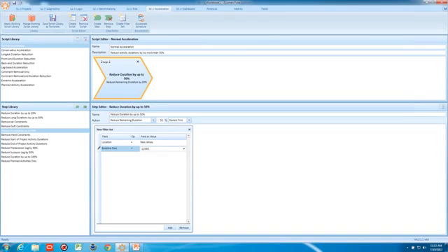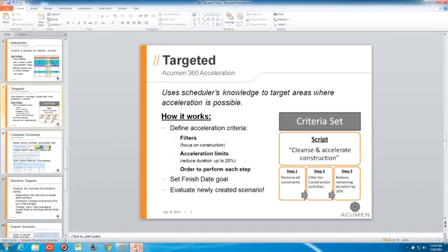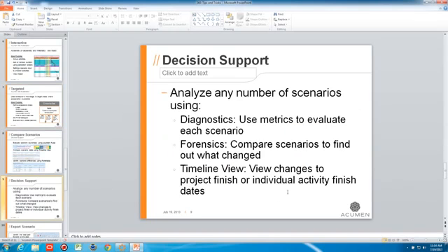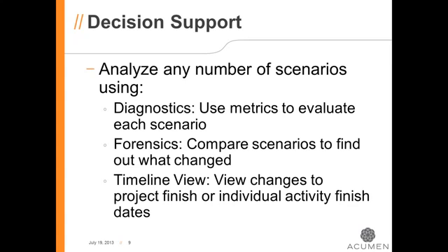So I could say location equals New Jersey, and then establish where the, let's say, baseline cost is greater than a certain value. And I can just type that value right in here. That's the ultimate level of focus for my optimization activity. You might have departments where the intervals are standard and there's nothing that you can do to affect those intervals of production. So you can use the filters to leave those areas alone while also using the filters to target areas that are ripe for optimization.